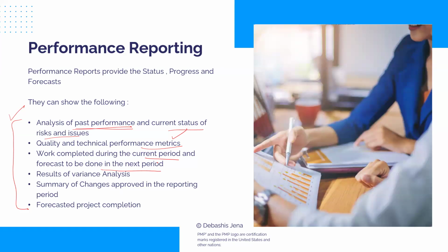On these lines, you state how many activities we undertook in the last week, and how many deliverables were created. You include that. Similarly, you provide a projection for the upcoming week. What's the plan for the next week? How many more deliverables will you create? How many new activities would you begin? Which ongoing ones are you going to complete? You would generally include that.